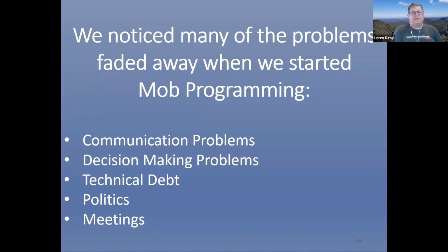The other thing that's an advantage of working this way is that we're able to work in an agile fashion, but eliminate most of the agile ceremonies. What I mean by that is, if you've worked on Scrum teams or on Kanban teams, usually there's about anywhere from 2 hours to 4 hours a week of time that the team members have to give up as productive work time, because they're in grooming sessions, they're in playbacks, they're in retrospectives, there are various different ceremonies that are chewing up a lot of the team's work time.